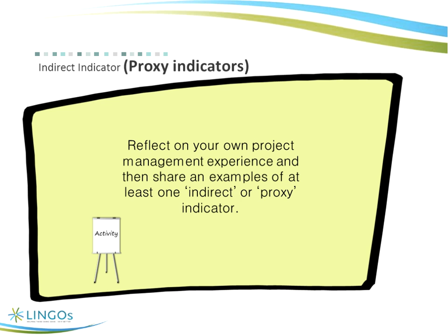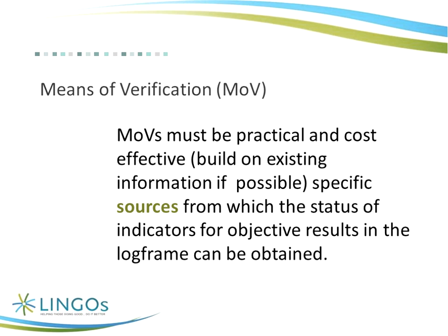You have to use focus group interviews, asking people about their behaviors, or in some cases maybe looking at how much people are purchasing items such as soap or condoms as a proxy of whether or not they're actually using them. Okay, so proxy indicators are extremely important as well. Okay, so that's a type of indicator.